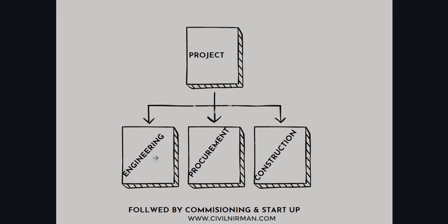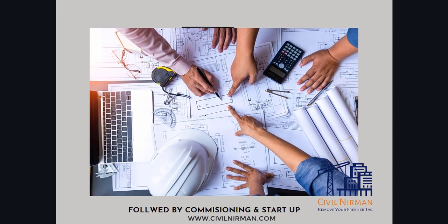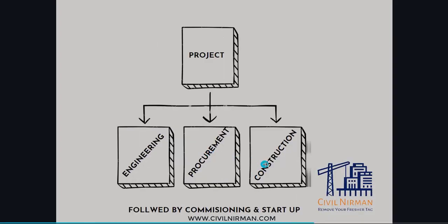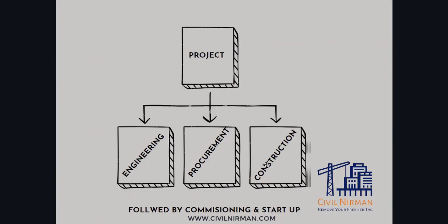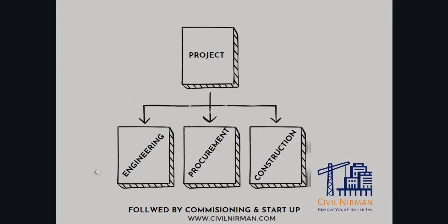Execution of a project for an industrial facility consists of three main activities. First is engineering, second is procurement, and the third is construction, which are followed by commissioning and startup. Engineering designs the facility, produces the list, specifications, and data sheets of all the equipment and materials, and issues all the drawings required to erect a particular plant.